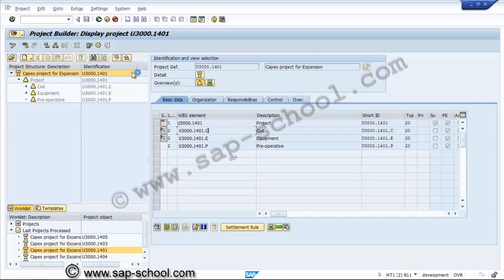If we have the individual resource planning by WBS level wise, it will be better. So all the time it is better to create a network against a second level WBS element. Otherwise, if we feel we will be having very few activities, we'll have only one network, which will be assigned at level 1.